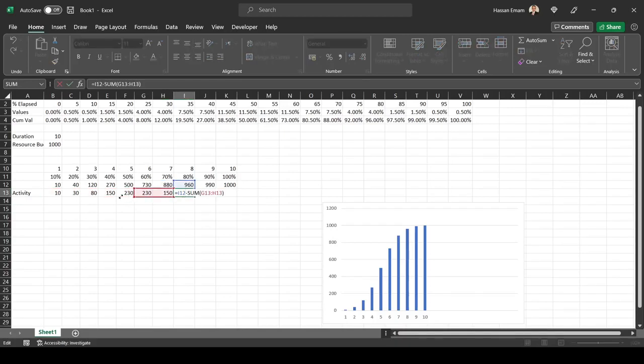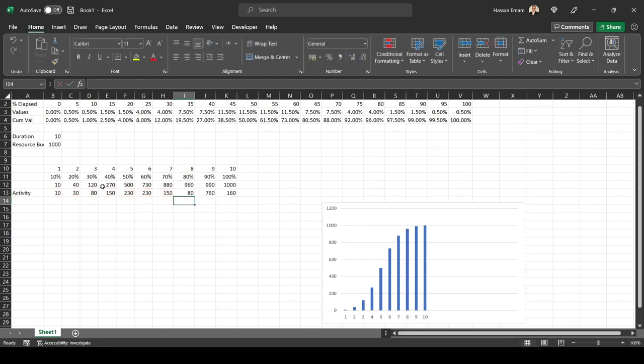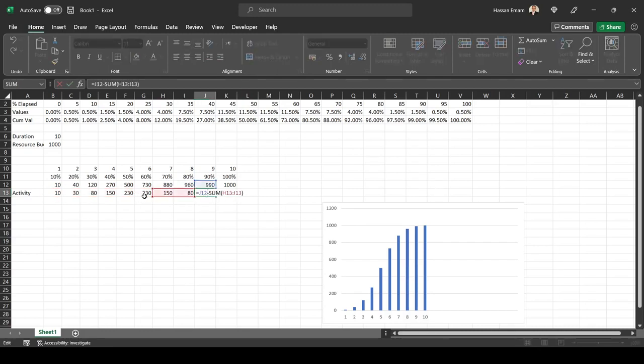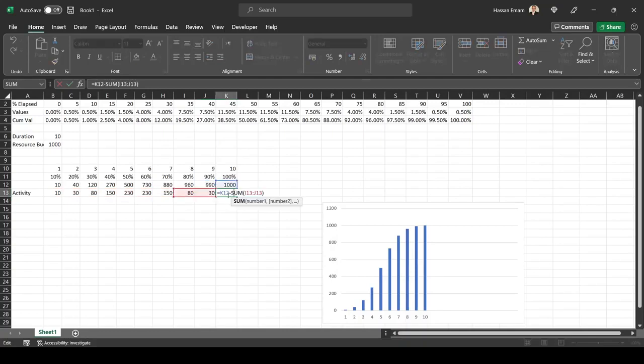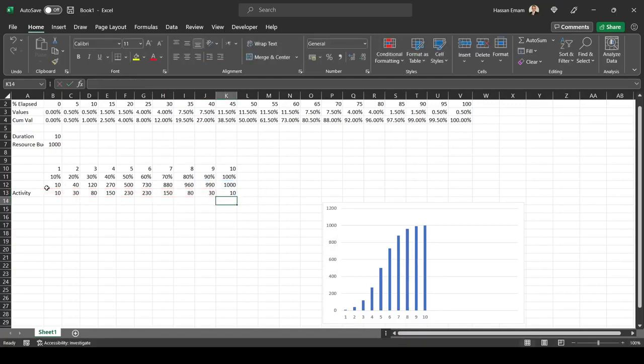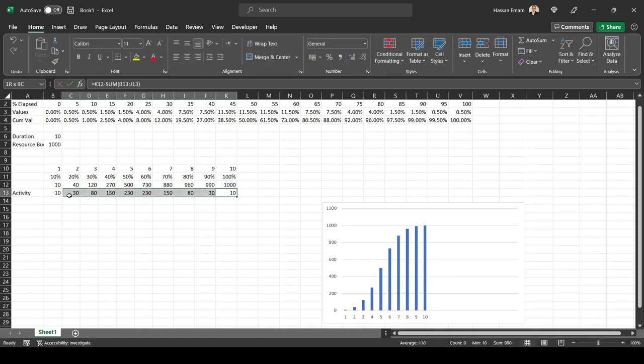The easiest way of checking it is to go through to P6 and check the peak. The peak should be the 230 units that we already have, and if that happened, that means our calculations are correct. What would be the use of this? I've seen a lot of people talking about these curves and whether these curves are important or not.